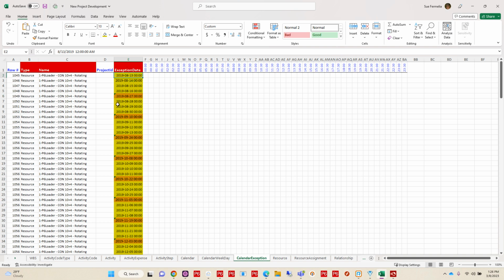So I've started out with my first work day, and then I'm going to increment it each day for my first 4 days off, and then jump to my next 4 days off, and so on and so forth to define those. This allows you to more accurately set up those days off or those exceptions to your calendar